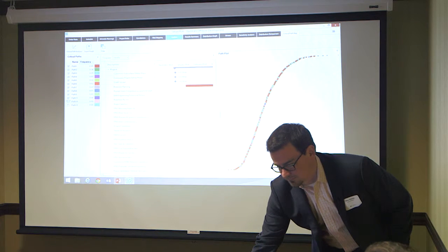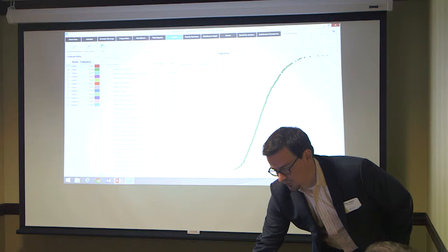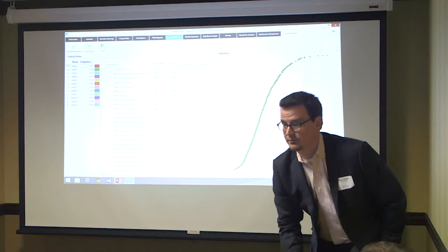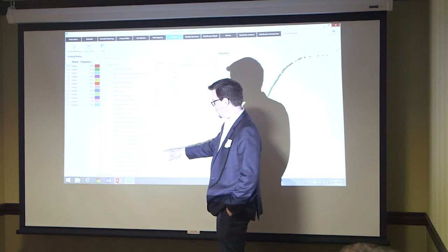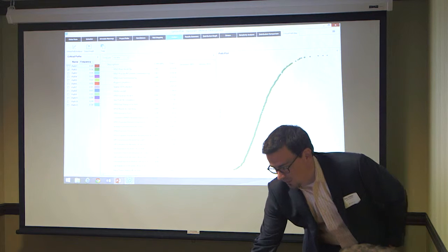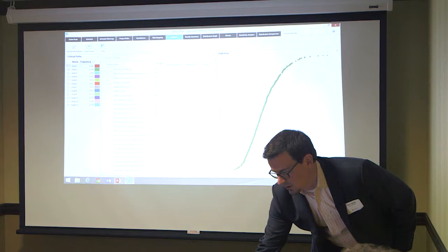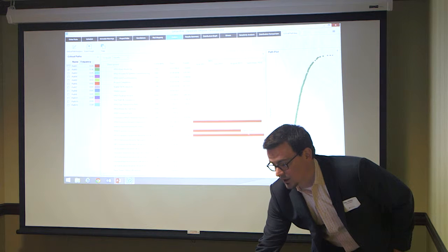Let's go focus on just one of these now. So I want to say, well, this is another path that I'm not quite aware of. I can see here which activities are included because we track, here's our criticality index, right? How often is that activity part of the critical path? So I can see it's only 30% of the time, but it's still significant, right? That thing changes. And there's also a visual view here. If I look at, there's my duration spread of it. I can also scroll out and see those activities, and I can see which path they're part of, right?